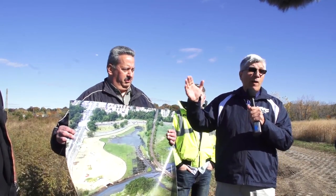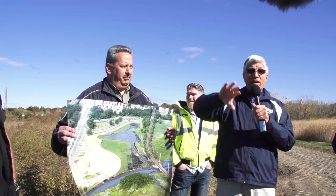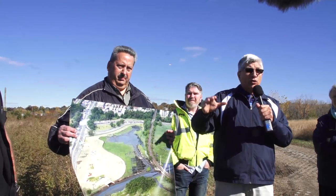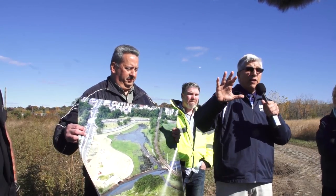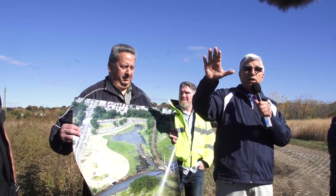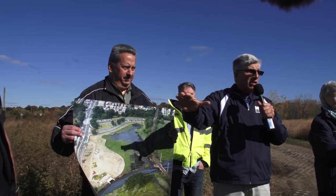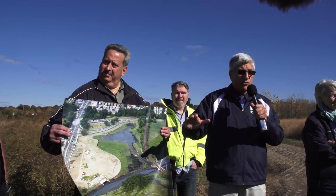So they're responsible for coming here and operating the pumps when we have to do a pump back to Tallman Island, when we send the liquid. We do that manually. And also for all the vector operations here to remove the grit that accumulates in the tanks. In addition, just to let you know, even in this space, they have to close down this part of Northern Boulevard for like 10 minutes when they mobilize in the morning and leave. So if it's a much tighter area, there's going to be much more traffic control and much more interference.